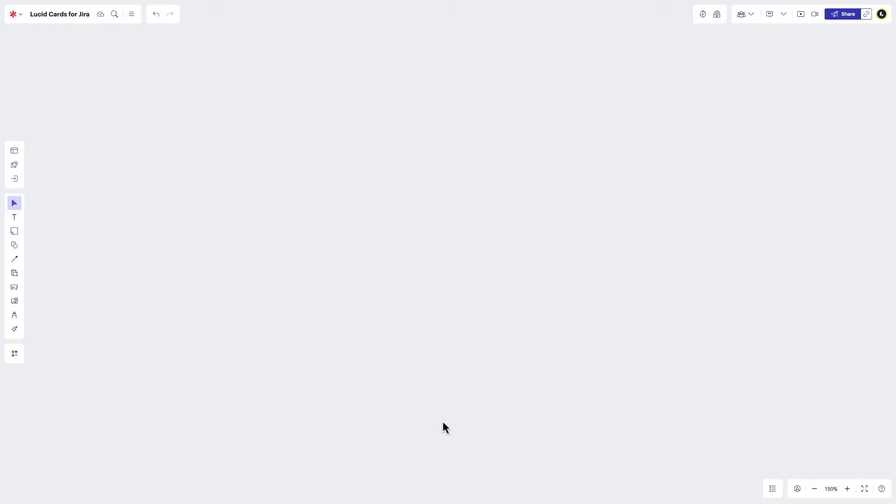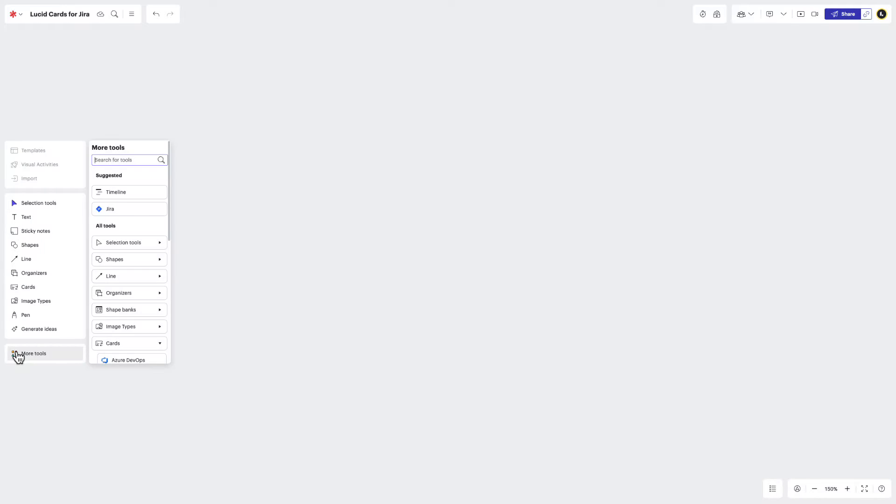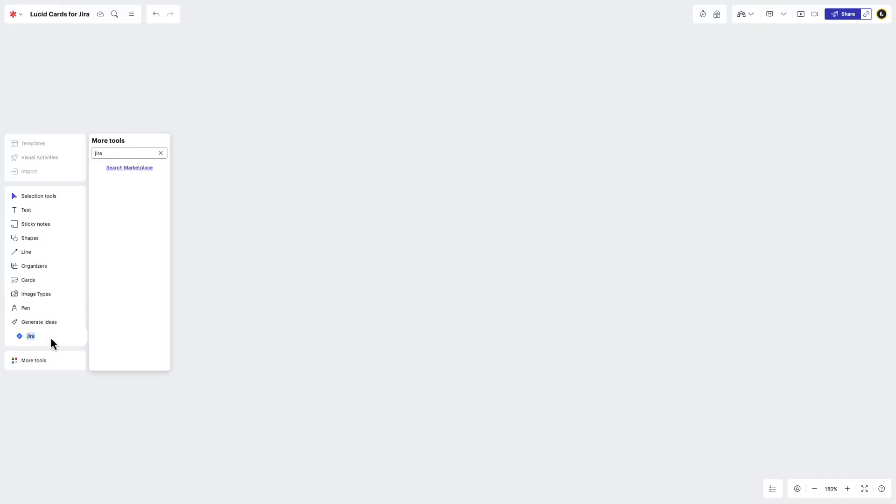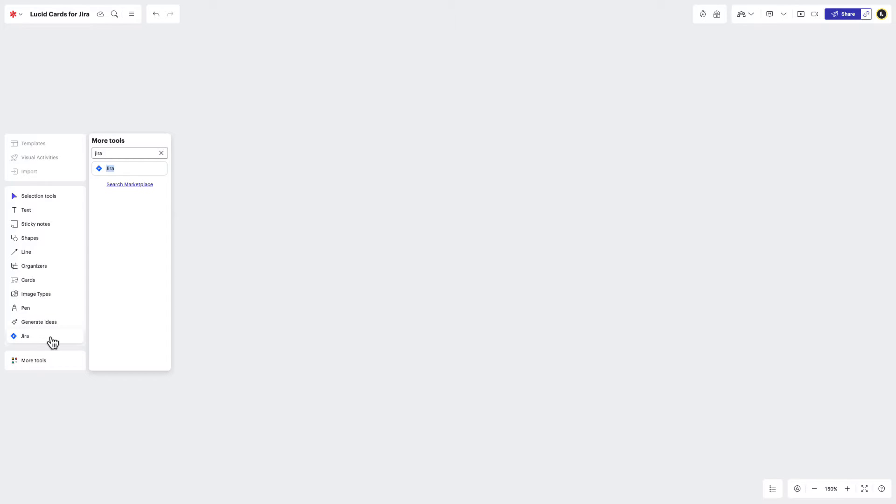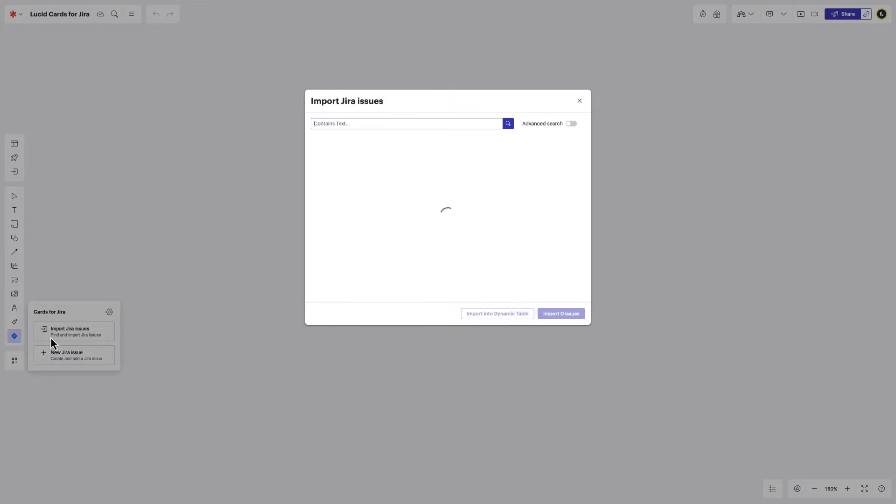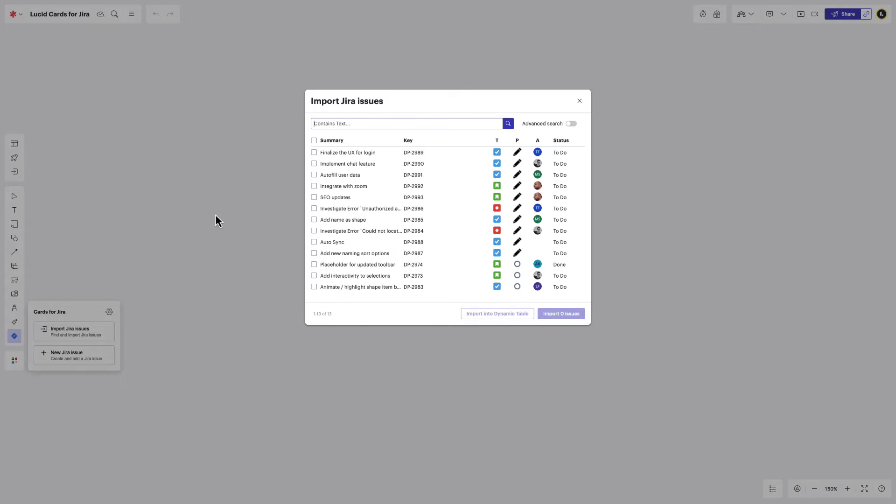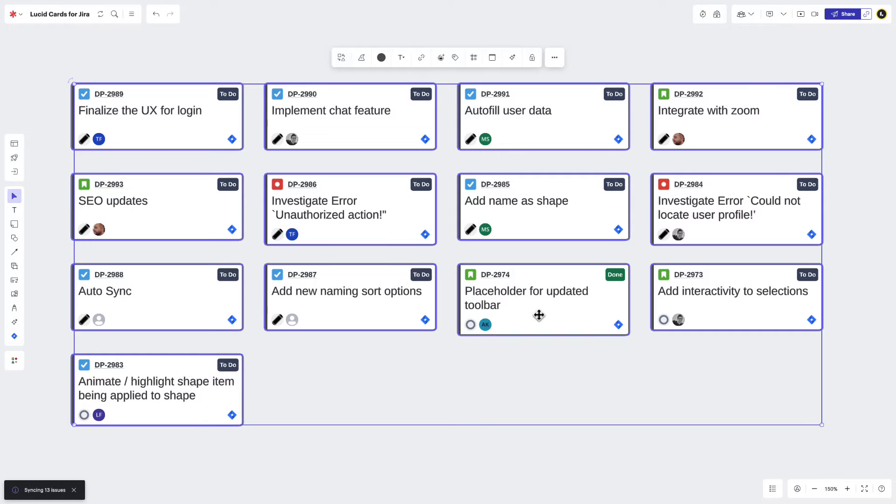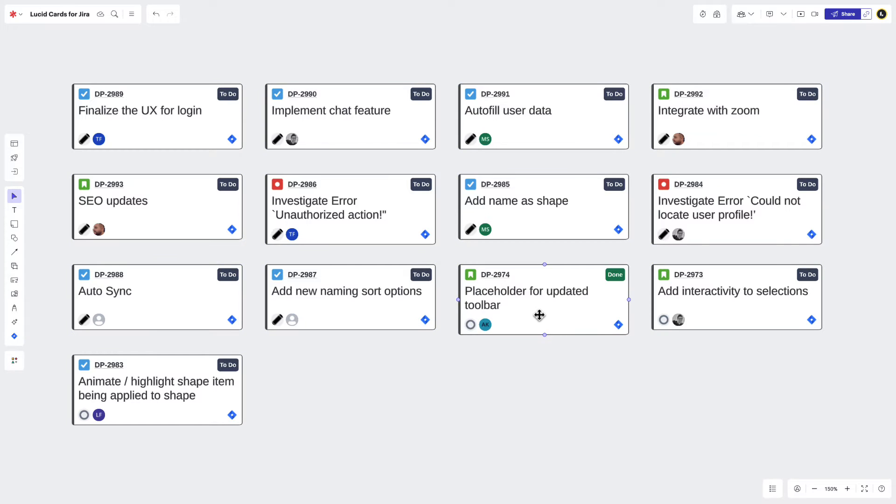To import an existing Jira issue, navigate to more tools and look for the Jira icon. Drag it into your primary toolbar to make it easier to access for next time. Then click the Jira icon and select Import Jira Issues. Choose the issues you'd like to import or toggle Advanced Search to look for specific issues with a JQL query. Once you've found the issues you'd like to import, click here. Your Jira issues will then be imported into LucidSpark and visualized as Lucid Cards.